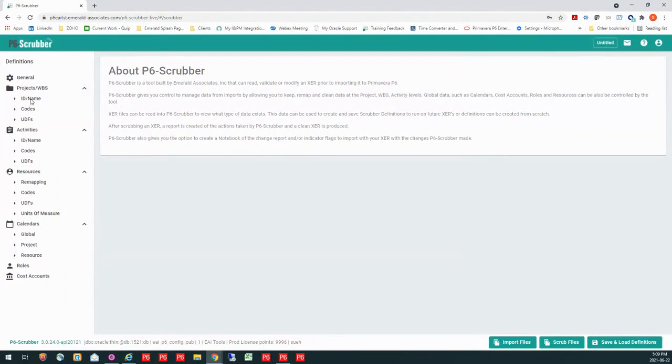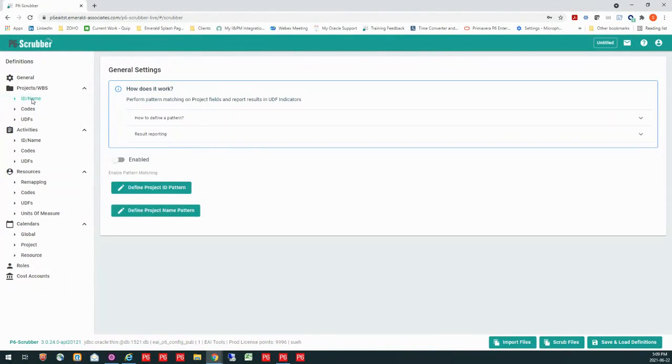So the first thing I'm going to show is one of those validation pieces, and that's going to be an ID and a name check, so to speak. You can do it on project and you can do it on activities, IDs and names. I'm just going to open up the project one here. Now, for each module, you're going to choose whether you want to enable that to run on the XER or whether you don't need it to run. So if you do want it to check and do this piece, you're going to enable it, and it's just a toggle button. By default, they are turned off.